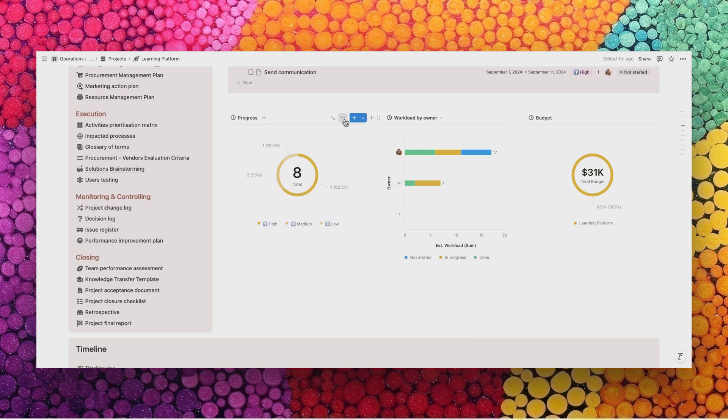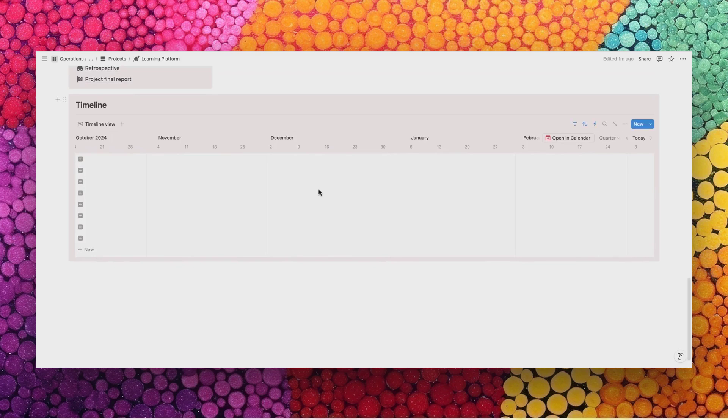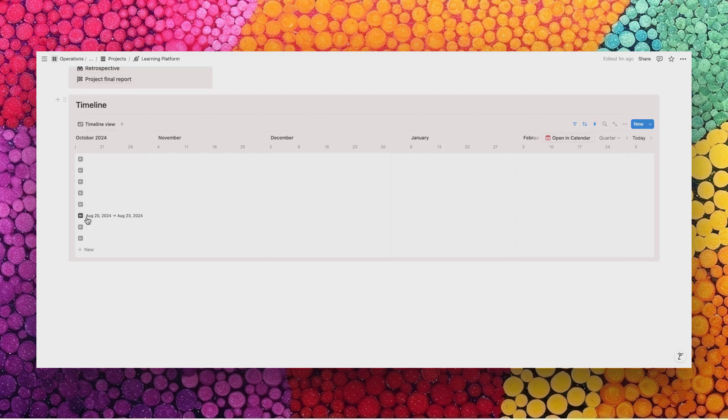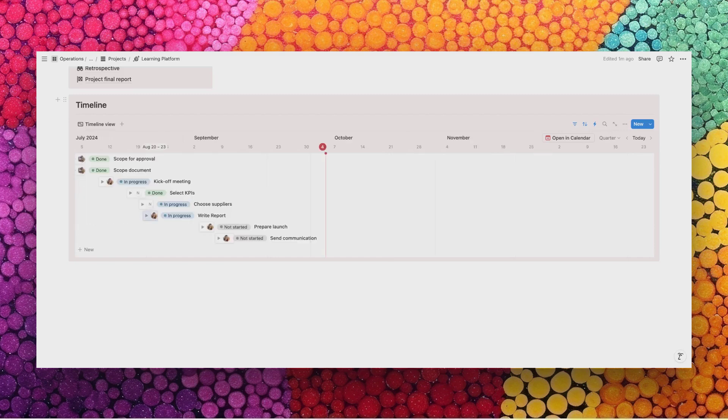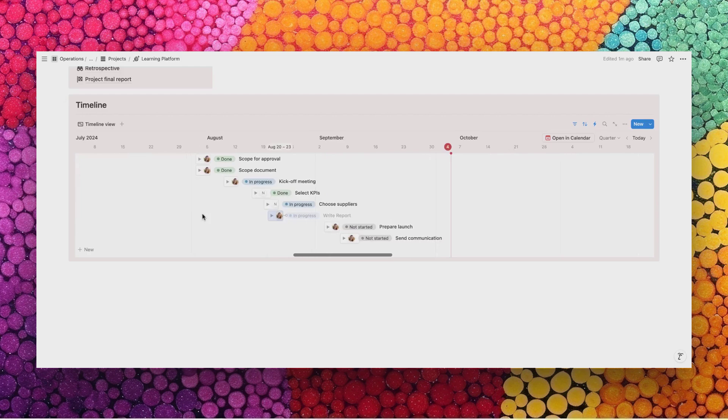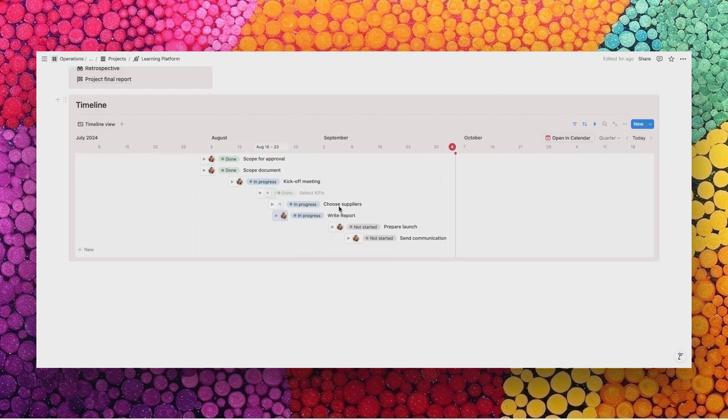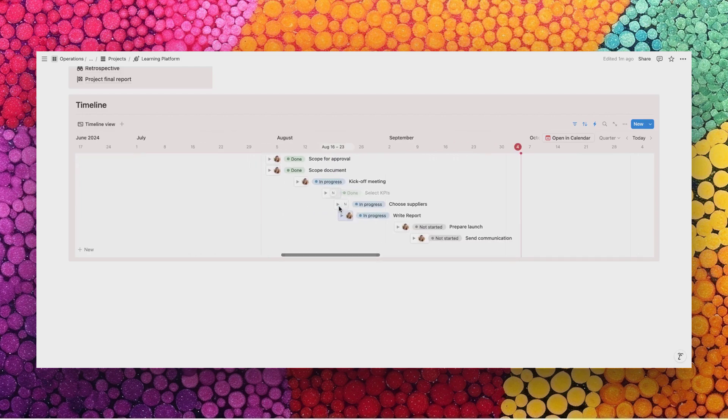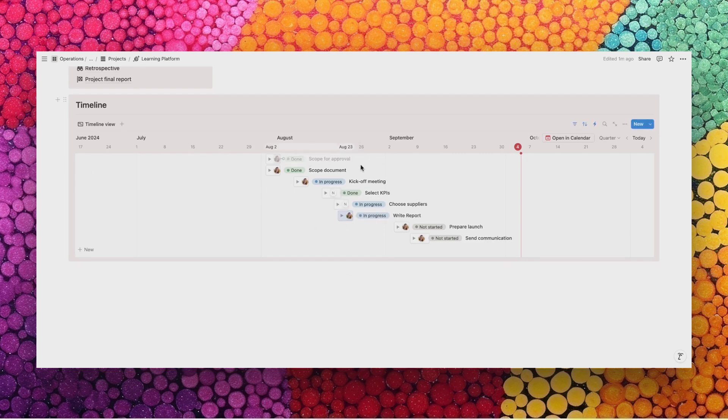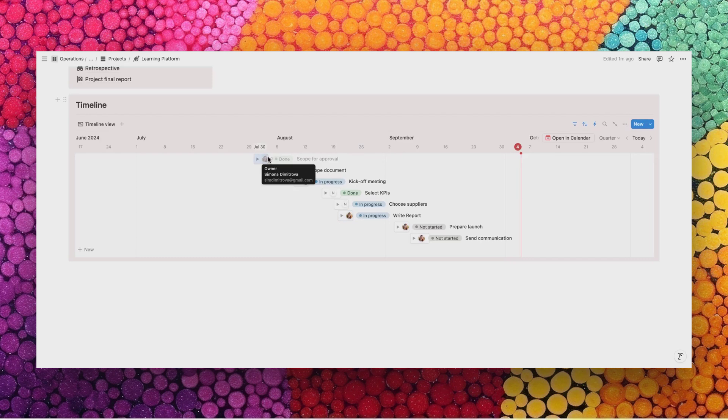At the bottom you can see the timeline. If you have the same view as me you can just click here on any of those arrows. By default, Notion would open the view on the date today. In this example, the timeline of this project is in the past so we need to go back in time to see the full timeline. A tip for you, if you need to modify the dates you can simply drag the different tasks. You can go at the very edge of each of the tasks to make it longer or shorter.